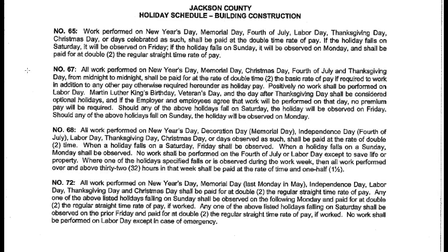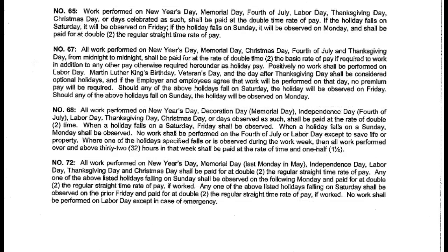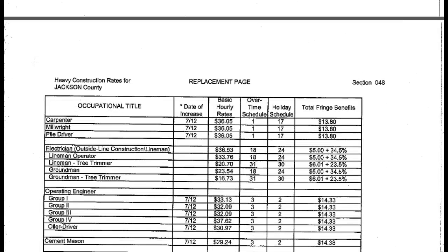And you can see, and once we get to Primavera, you'll notice that you can set up different holiday schedules for different classes of work. And the reason you have to have that particular function or feature in Primavera is because you can see different classes and classifications of work, different occupations have different holiday schedules. And so you have to be concerned how that changes.